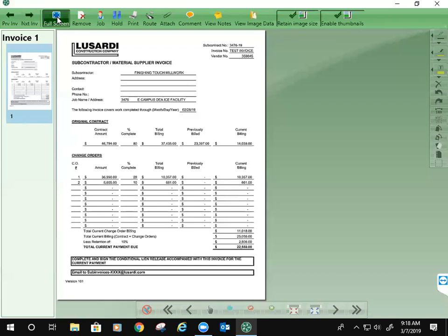So we're sending those out in accounting. It doesn't have any dollar value in it, Rachel, when we send it. We just get them, and they'll follow the regular billing cycle for subcontractors. They'll have all month up until the 25th to populate that form. Yes, just the specific contract number, vendor number, job name. And we don't put in their contract value or any of those items.